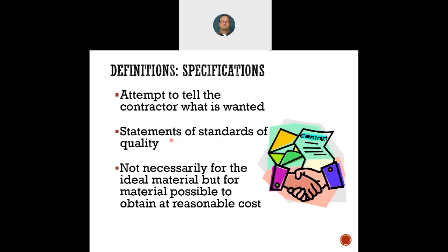Okay, and then when we talk about this here, say a contract, this is relevant today, COVID, right? We're running out of, we can't get certain products, right, because of the shortages. Okay, so the contractors say, hey, I can't get this product that you wanted specified in the specifications. However, can we replace it with this similar product, and then it's cheaper and it'll maintain our serviceability requirement? The quality is still there. Okay, so that's what that's all about. So it's a relationship.